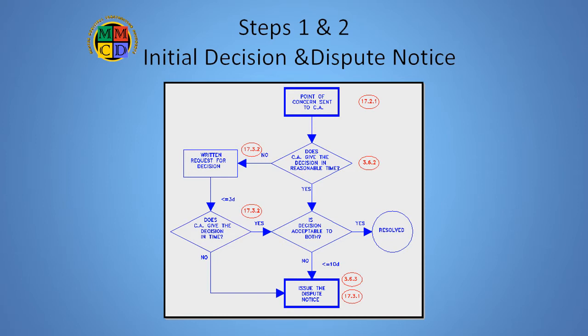Then within ten working days of receiving the initial decision, a party intending to pursue the dispute must file a formal dispute notice in writing. The ten days is a hard limit. Missing this deadline means the CA's initial decision becomes binding and is not appealable through the rest of the process. Let me repeat that. Failure to file a dispute notice within the ten-day requirement crystallizes the initial decision and no appeal is subsequently possible by either party. GC 17.3.3 and 17.3.4 define the requirements for the contents of the dispute notice and emphasize it must be a separate written notice, not just some mention in another document.